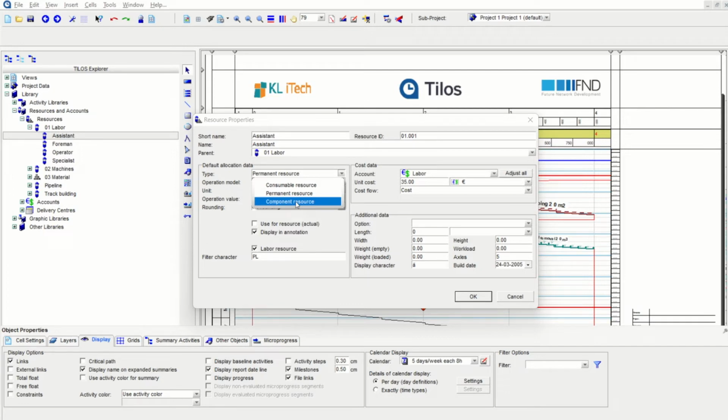In the concrete truck, you can see that there are 20 cubic meters of concrete as our consumable resource, and the equipment, the concrete loader or the mixer machine, will become your permanent resource. In that fashion, it can also be created. Here it is a permanent resource.